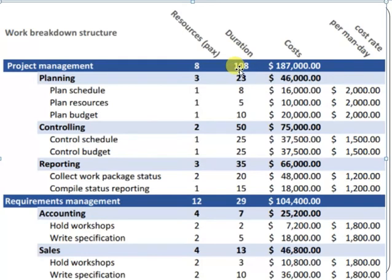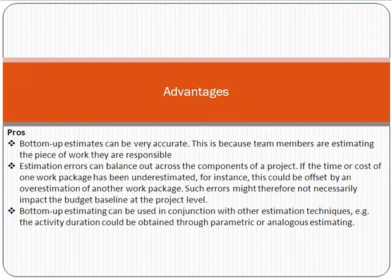Bottom-up estimation is more accurate. Its advantages are: it is very accurate, and estimation errors can balance out across the components of a project. If the time or cost of one work package has been underestimated, this could be offset by an overestimation of another work package. Bottom-up estimation can also be used in conjunction with other estimation techniques — for example, activity duration could be obtained through parametric or analogous estimation.